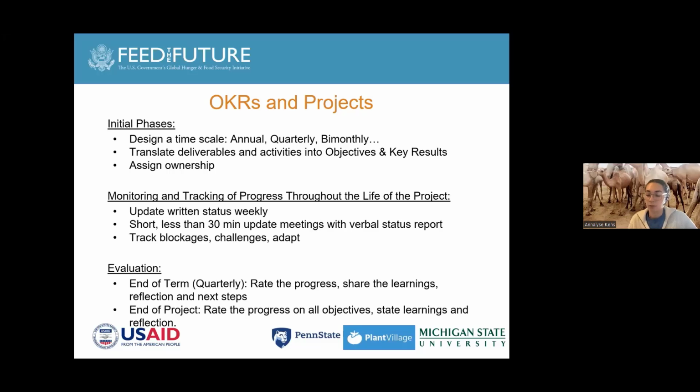You'll continue to report on your OKRs. And then at the very end of your OKRs, whether it's at the different change points for your objectives and key results, we report and evaluate on a quarterly basis and also at the end of the year. So we report on a quarterly and an annual basis for all of our OKRs.